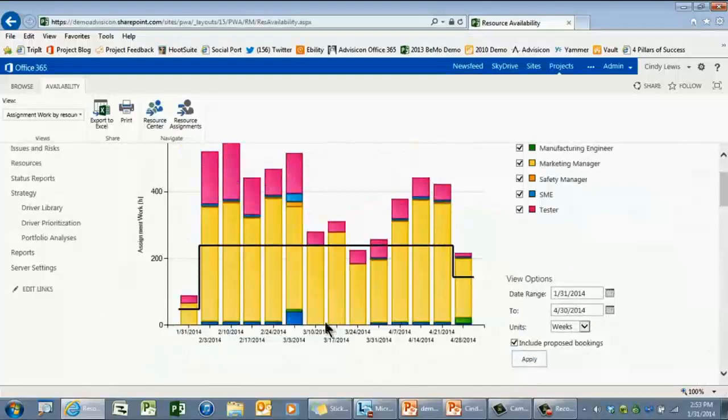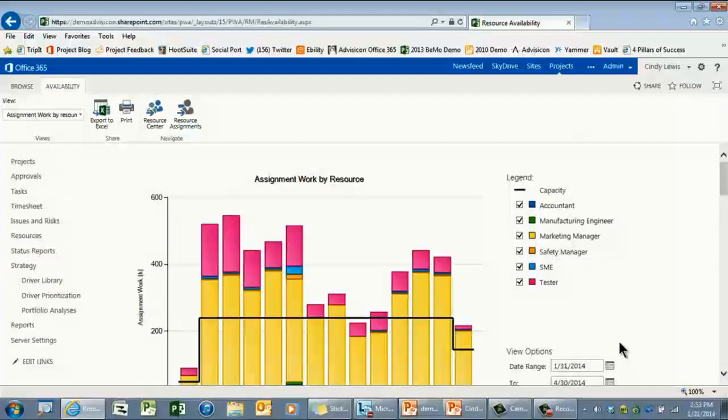Do you see how the resource plan can affect things? It will affect their capacity, their availability. And the big advantage of that, I don't know if you noticed, is even if I entered it in days, it divided it out across that time period. So it makes the adjustments whether I'm showing days, weeks, hours, and so on.